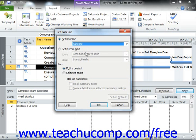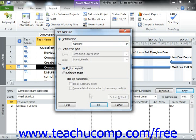Next, in the For section, select the Entire Project option. You can then click the OK button to save your current project file as the selected baseline.